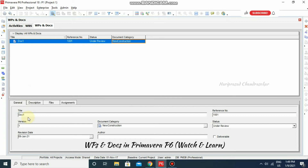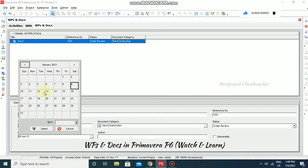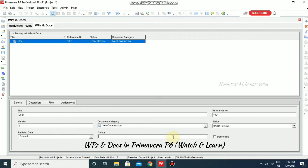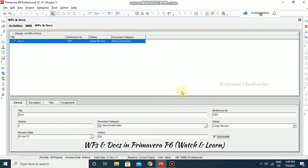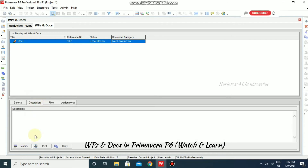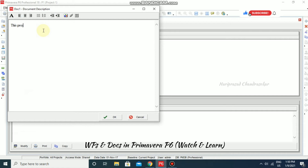Here we also have the General title and Version fields. You can specify a version number — I am entering 'First Version'. Then set the Revision Date — I am selecting a date — and enter the Author, such as 'GM' for General Manager, whoever is responsible for this document. You can also set the Status and mark it as a Deliverable. Under Description you can add details, for example: 'This project is going to start next month.'